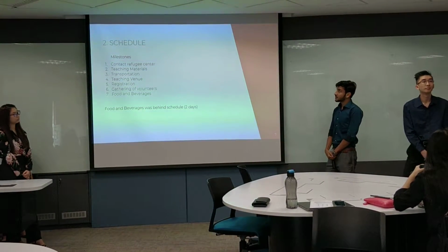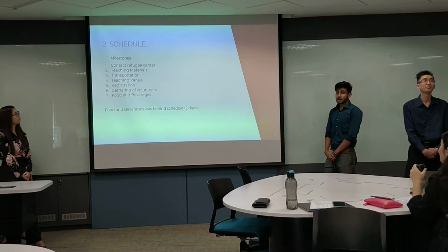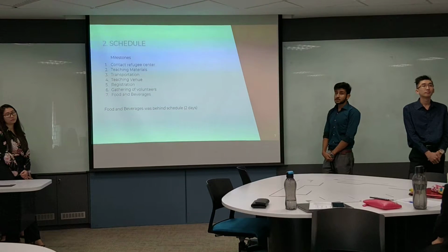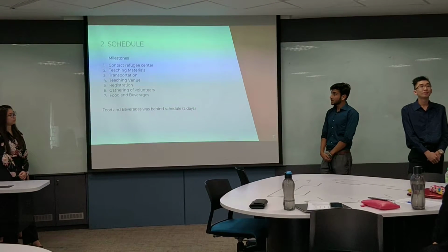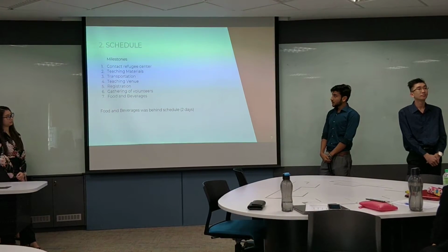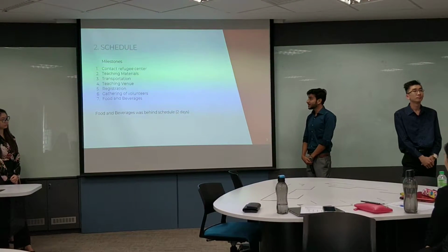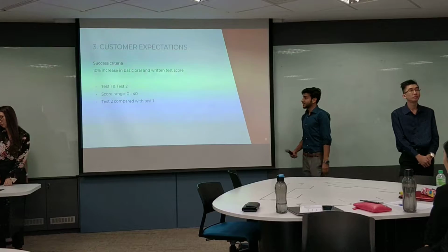The next criteria is schedule. We have 7 milestones in our project, and we completed all the milestones on schedule except the food and beverages one. It took 2 more days to complete this task. So now Yening will explain more about.